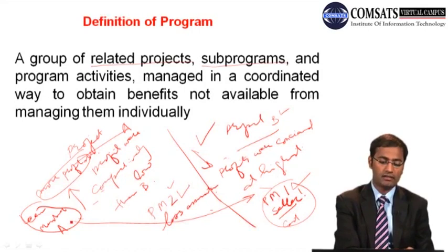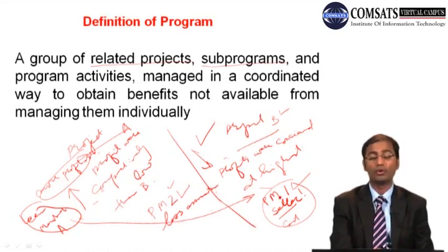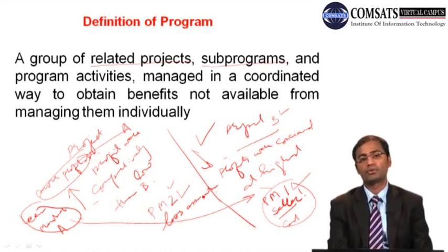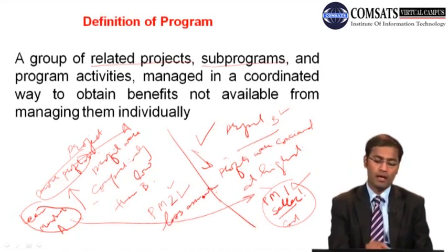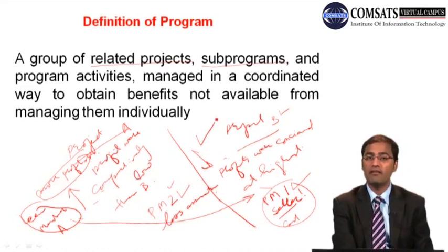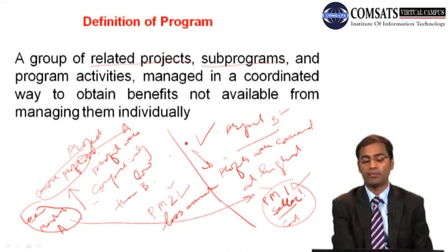Rather, he will ask project manager 1 to hold the activity, whereas project manager 2 will be given the resource, so that the opportunity which is present may be exploited to the maximum. Such a thing cannot be achieved if we don't treat two projects as a program.